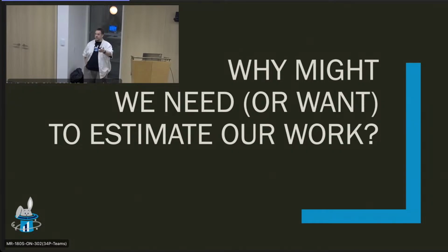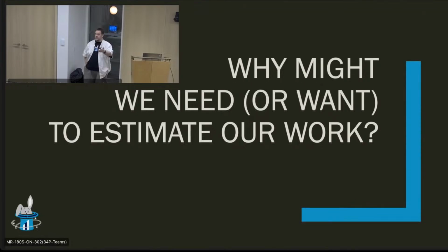The end of the story, though, is remember it took us 7.5 minutes to guess that it was going to be somewhere between 4 to 5, but probably 5 to 6 months. Yeah, it was 4.5 months. We had the thing in production and delivered in 4.5 months. It's incredible how fast our gut is at being able to compare this work to other work that we had done in the past.